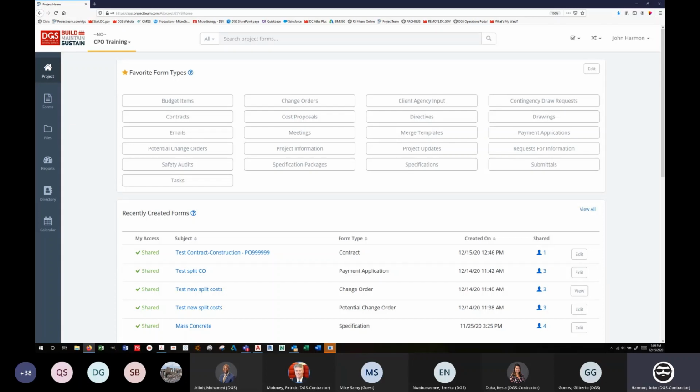Additionally, as talked about with the contracts, if you're getting supplemental funding POs for your contract, or you're getting the definitized contract, the target GMP, the early release package, all of those are going to be done as change orders to that base or letter contract as well. Okay, so anytime you get a new PO, that's a change order. That's the way the system has to handle it. Again, each PO is a specific record. You have to make sure that each time there's a PO, it goes in its own record.